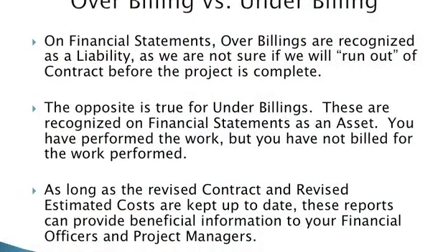There's a little confusion on over-under billings, at least on the financial level, in the sense that an owner of a company, if he's not in the know, is probably going to look at an overbilling and say, sweet, right? You know, bill, bill, bill. How come we haven't billed this yet? Well, overbillings, when posted as a part of the financial world, the overbilling is actually a liability. An underbilling is an asset, okay? And we'll get to that at the last thing that we talk about here.